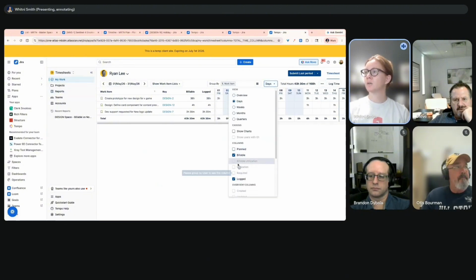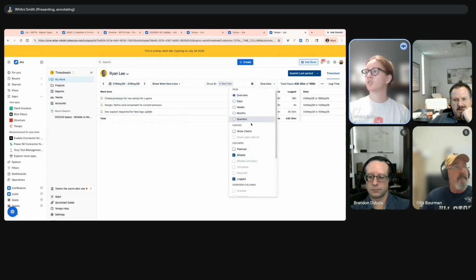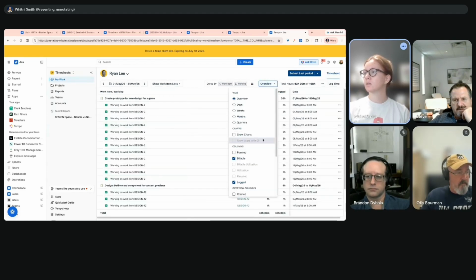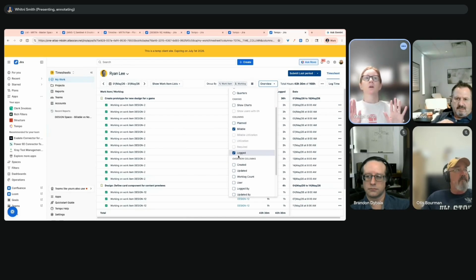There's this required time, and the utilization, which I think I have to have the work log. I need to break it down in a specific way, but there's a way to show the utilization and whether somebody's gone over that utilization. Okay. So their allocation, and then you could see they did 150% of the utilization, which would be the flag when you would see that breakdown. So in timesheets, you would be able to do that breakdown. That's where you do the allocation, and then see if they went over that or not.